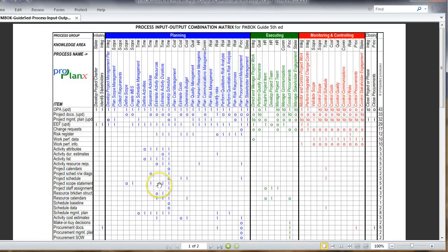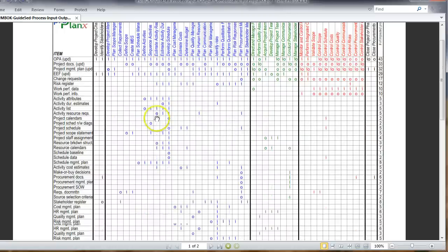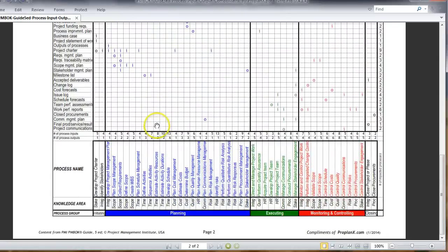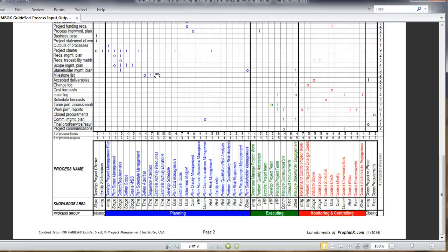And what is the output of sequence activities? We notice project schedule network diagrams and project documents updates. We may have more, so we'll just scroll down to see what else we have. We see milestone list, that's yet another output.